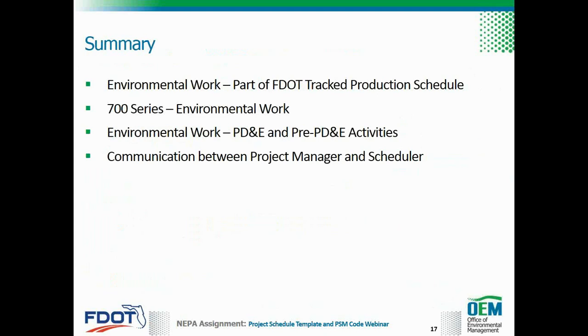Item number 4 is communication. I cannot stress the importance of communication between the project manager and the scheduler. For this process to succeed, you will need to meet with your schedulers on a monthly basis to discuss any changes in the project schedule.